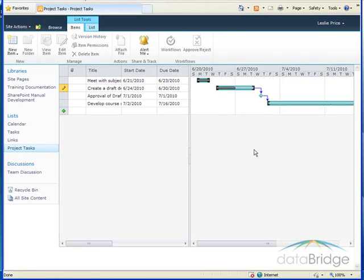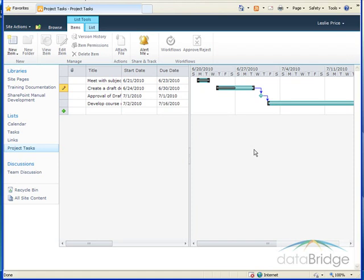Adjacent to each task on the right is a bar in the Gantt chart. The bar represents the start and end date of a task. The gray shaded area on the bar represents the percent complete. So if half the bar is shaded then approximately 50% of the task is complete.